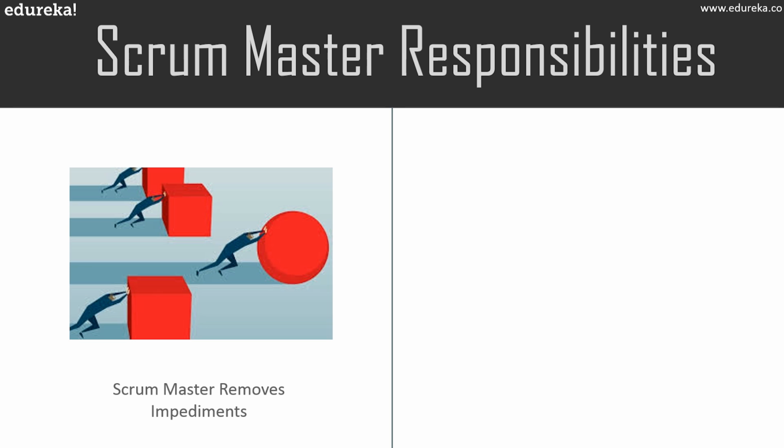So all of these that cannot be solved by the team come to the Scrum Master for resolution. The Scrum Master then prioritizes these impediments based on their impact and the risk they might have on the team, and starts resolving them one by one. At times, they even anticipate when such problems will arise and lay the groundwork beforehand so that they can avoid the problems. So, how does a Scrum Master actually clear the obstacles?